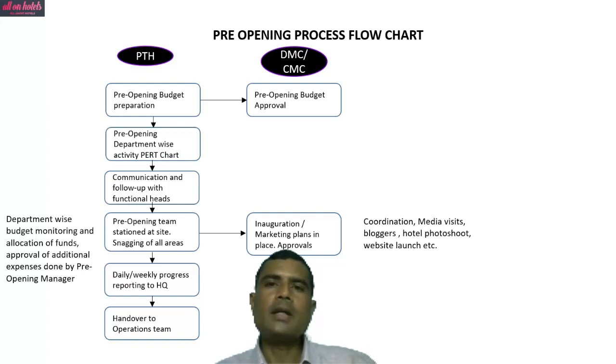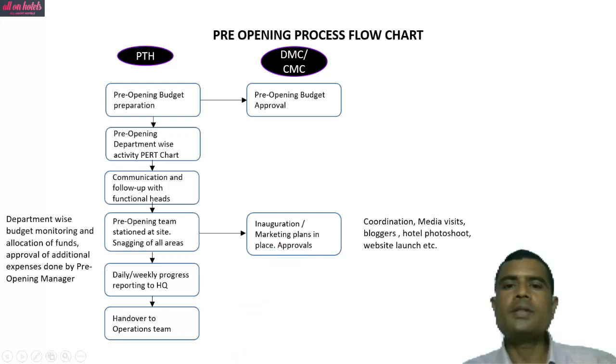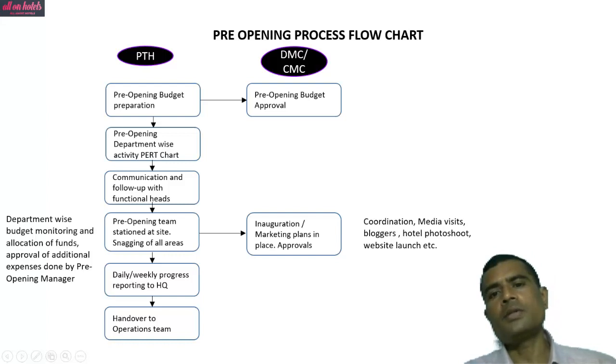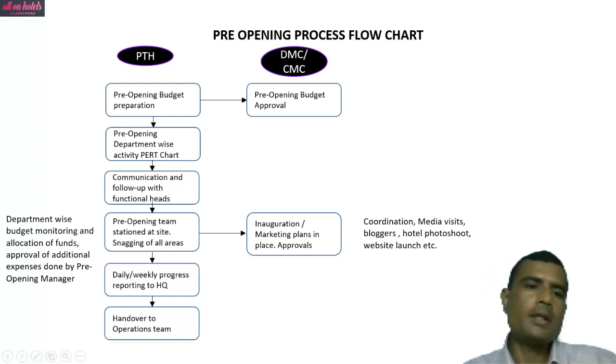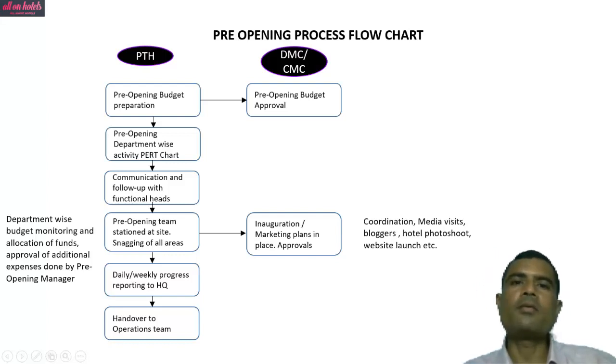Pre-opening team is stationed at site for 3 months, snagging all areas. In this time, the inauguration marketing plans are put in place. Coordination, media visits, blogger visits, hotel photo shoot is done. Website launch is done in this period because hotel is ready for photo shoot. Department-wise budget monitoring and allocation of funds, approval of additional expenses is done by pre-opening manager.